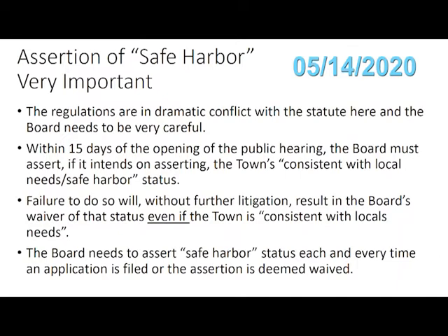Yeah, great question. Thanks, Angus. So it doesn't apply pursuant to the order, and Mass Housing hasn't shown that it's kind of playing ball with the order. So no, your comment period of 30 days, you can ask for an extension, and Mass Housing will routinely grant 1 extension, sometimes 2. But no, that is not considered a permit or an approval. It's a ticket. It's a discretionary process that Mass Housing in and of itself controls. So no, that would not be part of the governor's COVID-19 orders. But if you are feeling pressure in terms of time to offer comments to Mass Housing, my advice would be to ask them for an extension of time.